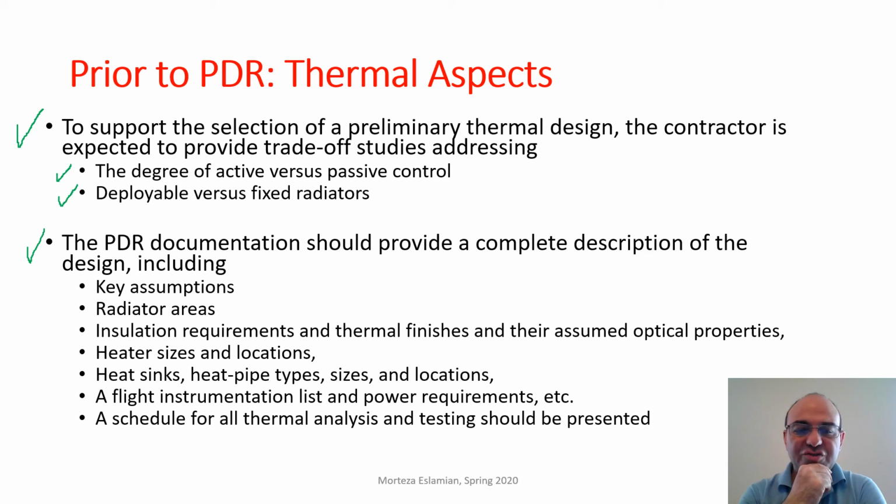A flight instrumentation list and power requirements should also be presented, because this is needed for the thermal load and cooling load, along with a schedule for all thermal analysis and testing, which is going to be done in the next phases.